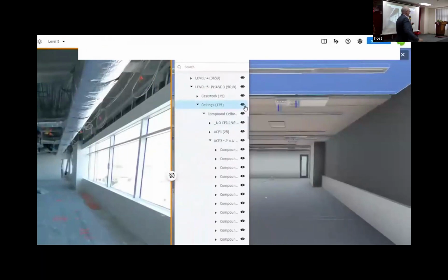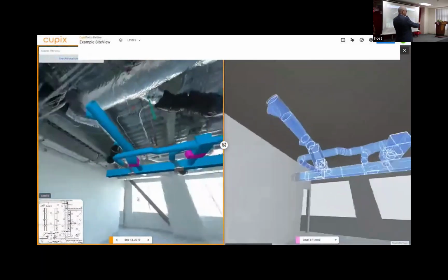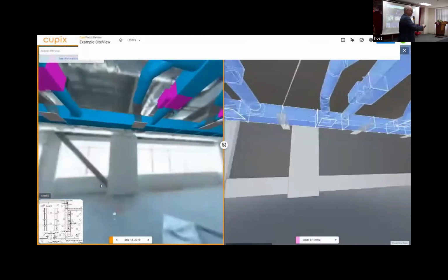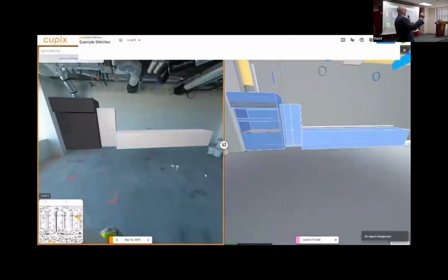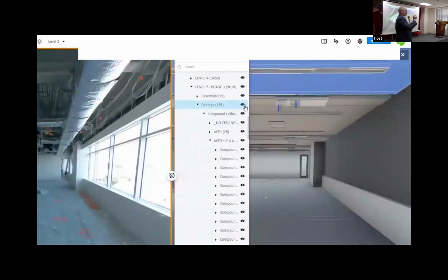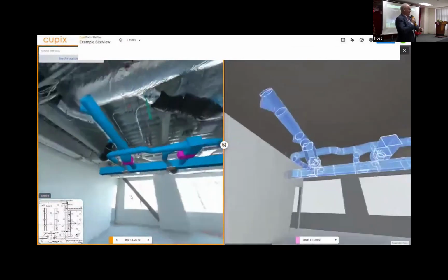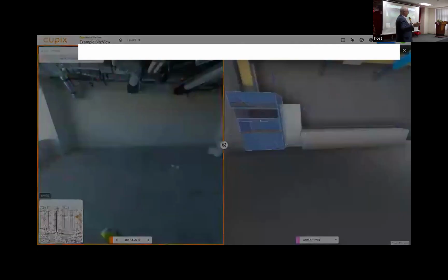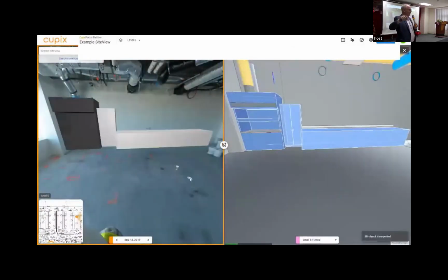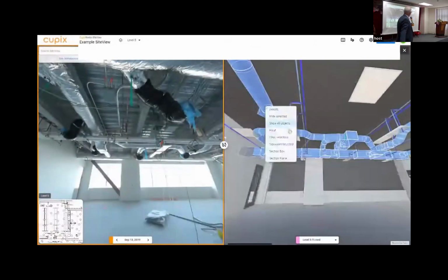The best part: you can take objects from the 3D model and impose them into the Site 360 models. So you can actually predict where something's going to be. You can put steelwork in, ductwork in, pipework in. So you can see what's going to happen next, or in the future. Again, as a project management team or as a client team, it's a very powerful way to supervise what's happening in construction.